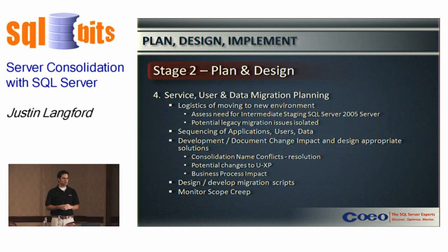Still within stage 2, we'll do some migration planning. So now we know what the end goal is, what the to-be environment is going to be like, and we know what our existing environment is like. So the next step is to look at the actual migration planning and what method we're going to use to move these databases from their existing location to the new consolidated environment. Maybe we want to use detach and reattach, backup, restore. For very large databases, we can use manual log shipping to minimize the downtime between migrations,